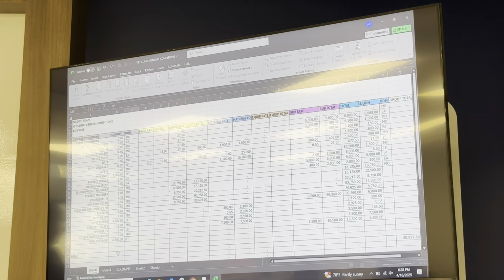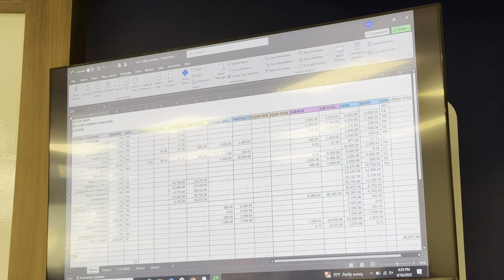Equal to square footage. That has been going out, let's call it 75 cents a square foot. 0.75. There. So that's somebody coming through at the very end of the job, vacuuming all the floors, wiping down all the walls, Windexing the windows, polishing up whatever stainless steel's in the job, just making the whole thing look good.